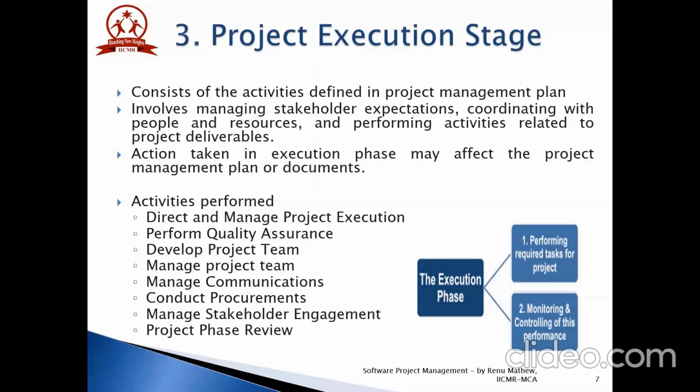At the end of the execution phase, project phase review is done. It helps you to document the result of your project management review. The activities performed are: inform the sponsor about the progress of the project, identify any risks or issues that impacted the project, show deliverables produced during the project to stakeholders, and seek approval to proceed to the next phase.